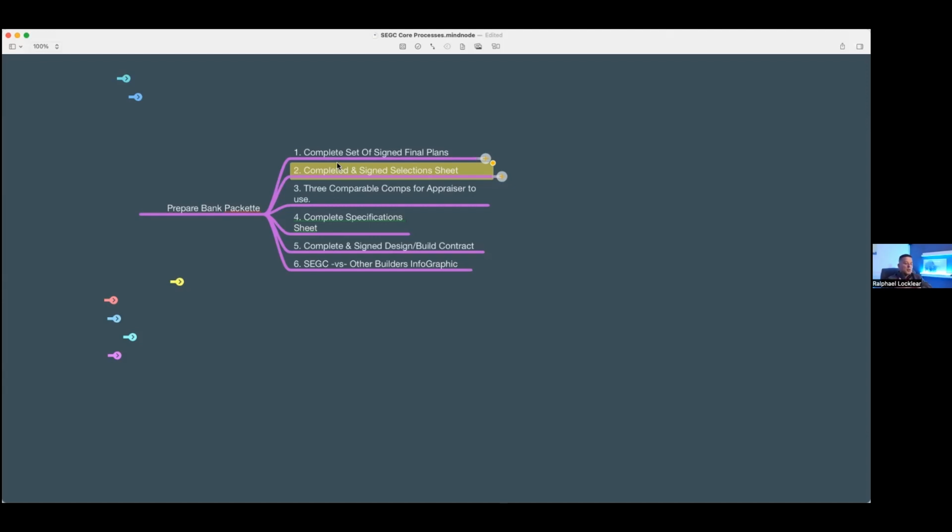If they have to pay another 2 months of interest and it's $2,000 a month, that's $4,000, and that becomes a problem. Then the builder is going to say, well, the reason it's taking longer is because I can't get the selections. And then they make the selections and fall in love with them, they get quotes, and the selections are outside of the allowances. So now they have to take more time off work and redo it again. How frustrating do you think that is? It's extremely frustrating. We've been there, we've done that. That's why we won't do it anymore.